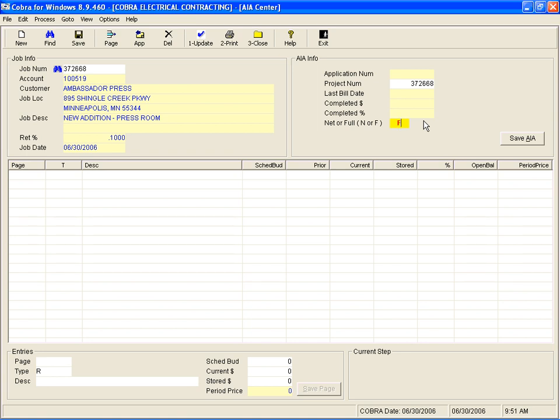So in other words, the net retainage means that it hasn't even hit your AR. It's not recognized at all because you have to bill for it separately as its own invoice at the end of the job. I'm going to be working mostly with full retainage, because that's the most common way that the system works. But I'll talk about the last application for the net retainage to talk about getting that invoice out.